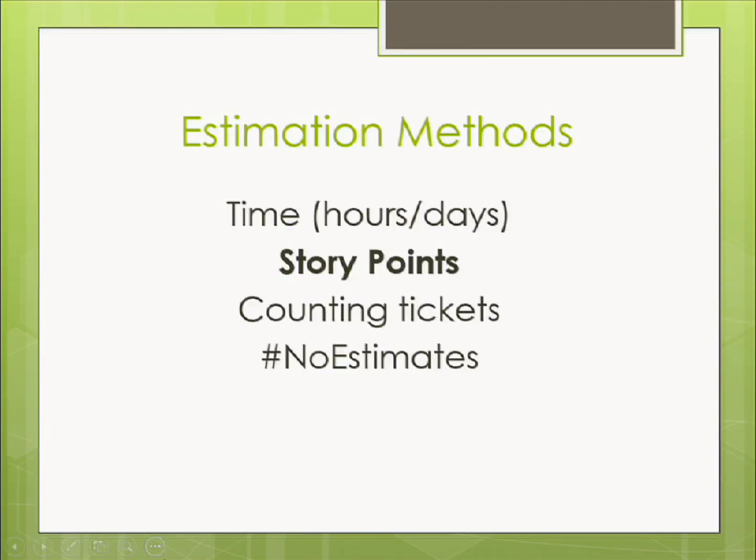Story points are a relative estimate. So you're estimating tickets relative to how hard they are compared to other features. How you do this is you take certain features that are different sizes and you assign a point value. You say, okay, this feature here is worth 1 point, and this one is worth 2 points, and this one is 4 points. And then you take all the other ones and you slide them in, like you're ordering them from easiest to hardest, and you're slotting them,